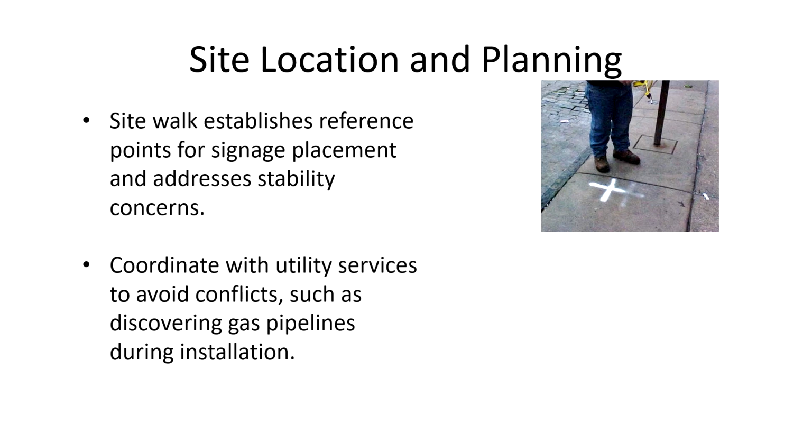During the walk, the markers are placed like this to establish the reference point for accurate placement of the signages. Once these markings have been done, the coordination with other services takes place. These coordinations are with geotechnical engineers, mechanical engineers and the service designers.